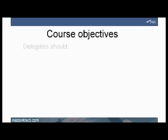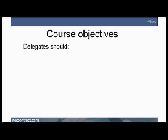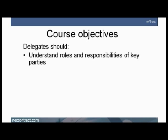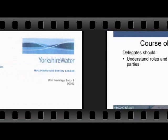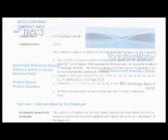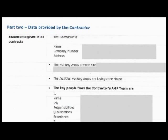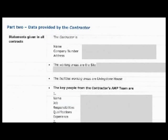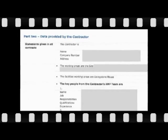Delegates should understand the roles and responsibilities of key parties. Those key parties include the employer, the project manager, and key contract data items such as the start date, finish date, the main and secondary options, the boundaries of the site, and so on. Part 2 is completed by the contractor and includes items such as its fee percentages.